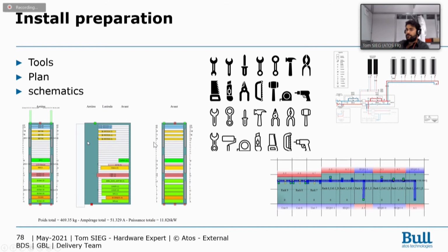We of course check the cable tray size to be sure it will be big enough for all the cables and prepared for maybe some future evolution of the cluster. And we double check the hole on the top of the rack is large enough to fit all the Ethernet and InfiniBand cables and all the power cables.